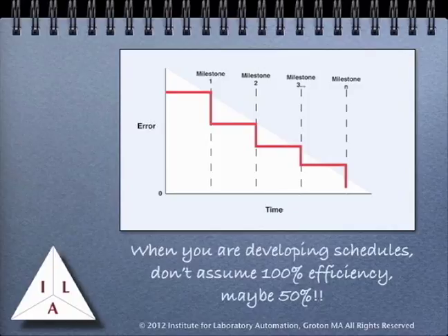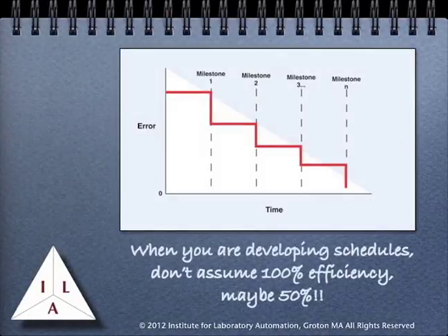If you look up strategies for doing estimates, you'll find all kinds of approaches. One is to break the project down into a series of milestones and make estimates for each one. At each milestone, evaluate the performance against what was expected and use it as a basis to make adjustments to the rest of the schedule. Continue doing this throughout the project. This will avoid surprises, and people do not like surprises when it comes to projects, unless it means coming in early and under budget. By carrying out this simple exercise, you show that you're on top of the project and being realistic about getting things done.